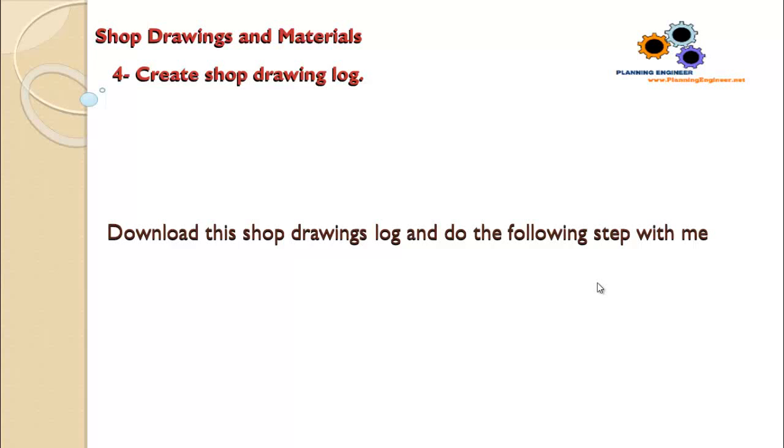Part 4. Create shop drawing log. The shop drawing log is an Excel file which will allow the document controller to enter all the shop drawings and keep monitoring the process of shop drawing from submittal, approval, and how many days it is pending with the consultant and so on.